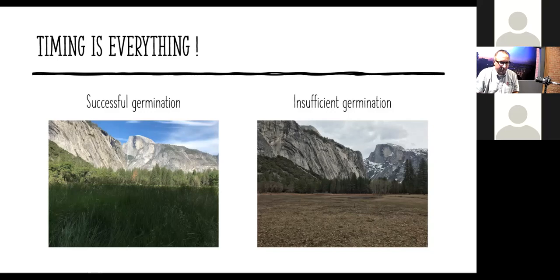I have another site, not Yosemite, but one just this morning. I was answering an email on this up on Highway Interstate 80. It's around 3,500 foot elevation. And we were like, hey, if you're going to hydroseed this, you better do it now, because while it's mild, we can get some fall rains before we get snow, let's see if we can get some germination in.